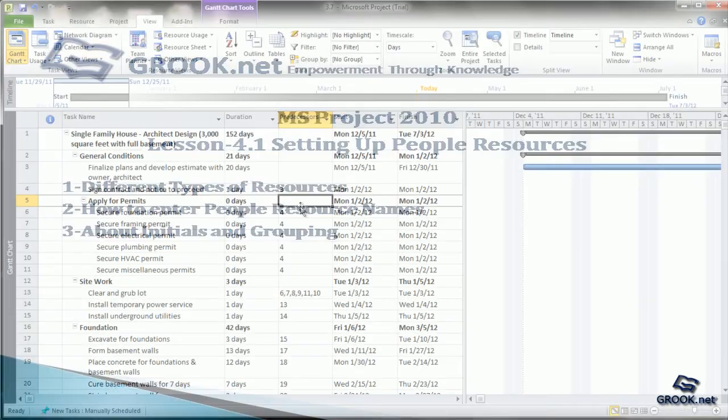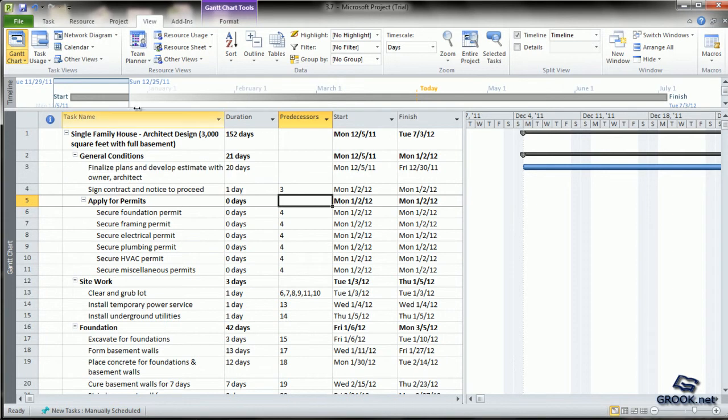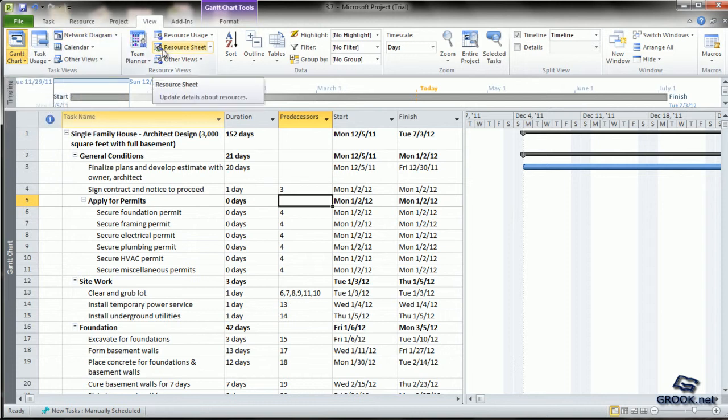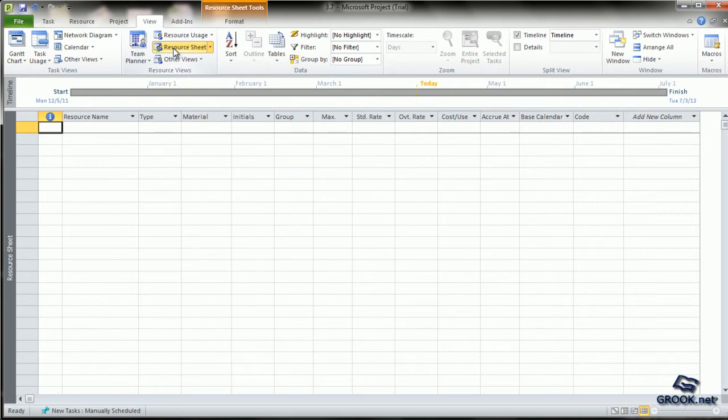Let us come back to our project plan. We usually view our project in the Gantt chart view. To add resources, we go to the resource view. For that, go to the view tab, then the resource view sub-tab and then click resource sheet.